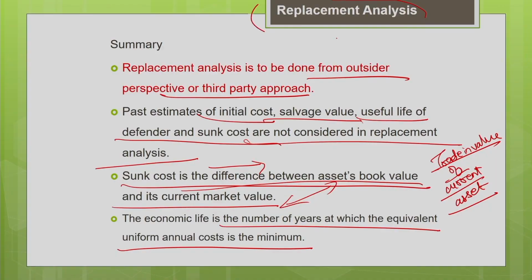Basically, we have dedicated three lectures, lectures 6, 7 and 8, to equipment life and replacement analysis. As I told you, when you do the replacement analysis, we have to consider all the components of the equipment cost. Then only you can get an accurate picture. All the costs, including your downtime cost, obsolescence cost, and cost of inflation, should be considered in the cost estimation to get an accurate replacement decision. Also, you should consider the timing of the cash flows. You should consider the time value factor so that you can get an accurate replacement decision. With this, let me conclude lecture 8.